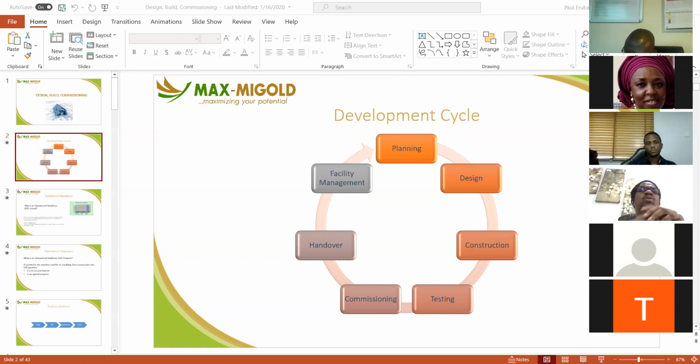Some owners will say, oh, don't worry, contractor will do it. We know he will do it. He's just talking. It's a lie. Make sure there's a line item. If that line item is going to be just 10,000 naira, let it be there in the contract. Okay, sir. So you mentioned the as-built drawing.